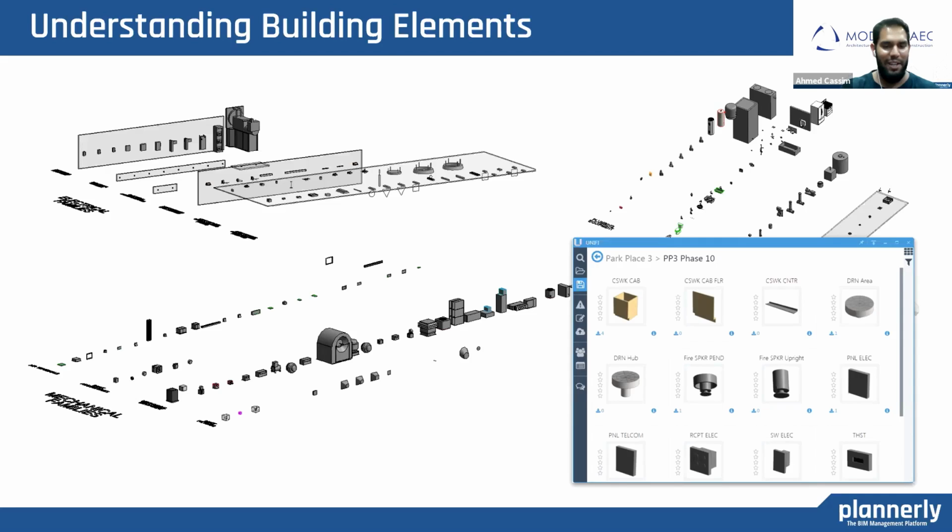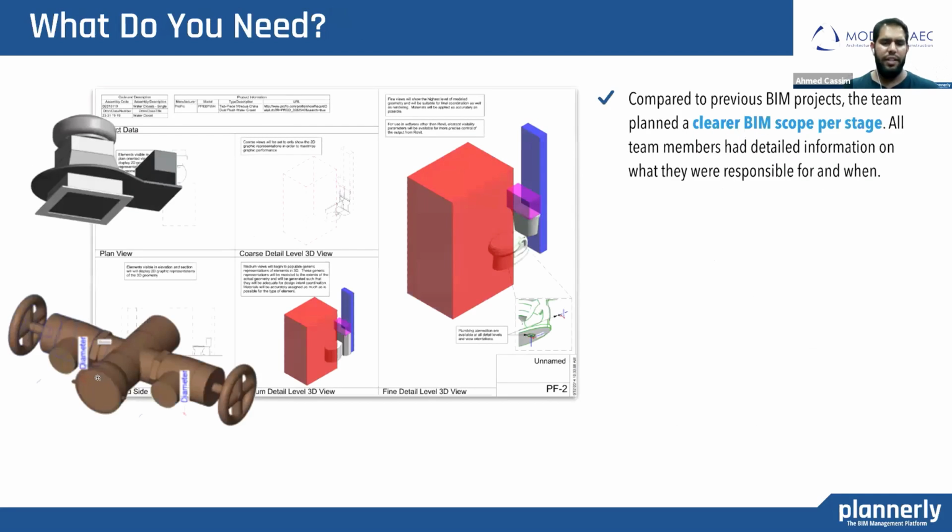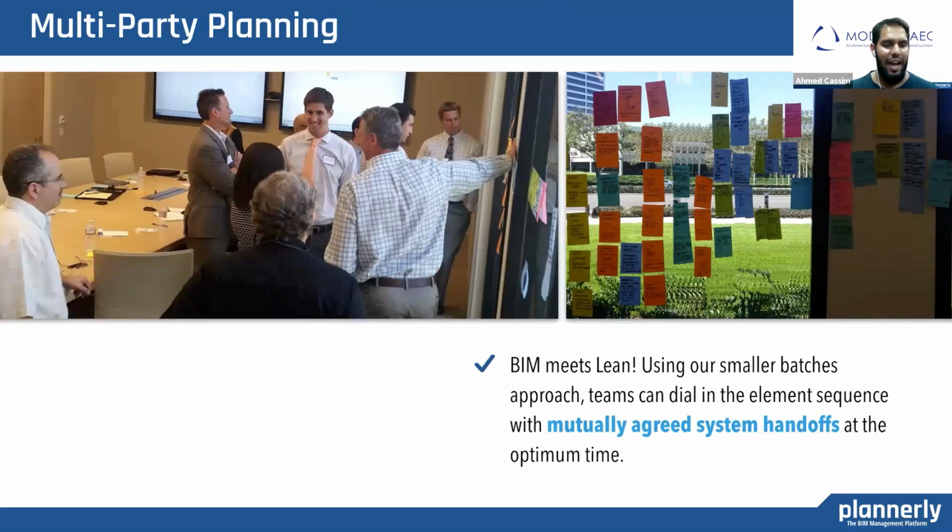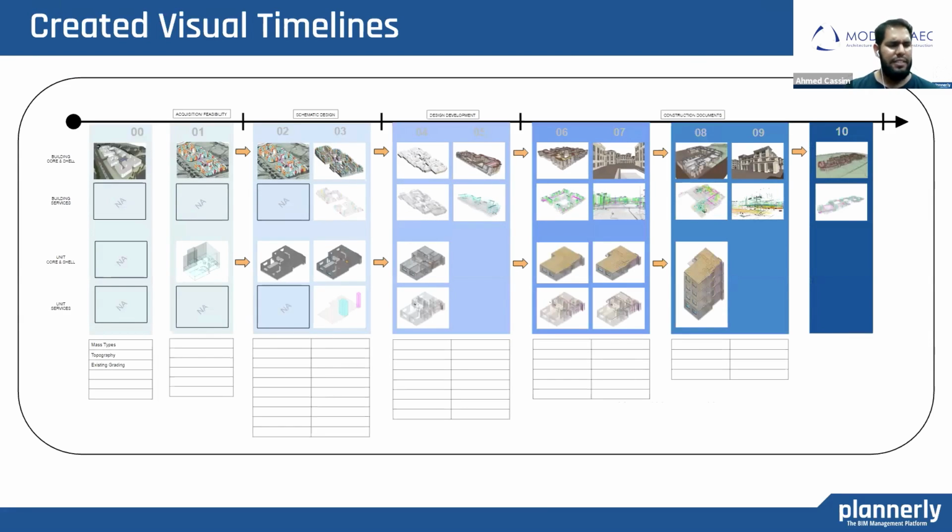And it's important to have multi-party agreements, because if we carry on behind closed doors, we are sure to have many more disagreements between stakeholders. Mutual agreements happen when all parties are in the same place doing pull planning. So in our current situation and our current work methods, we can't all be in the same room at the same time, so use online tools and programs to replicate that same process. It will become very powerful to get that agreement, as you have handoff of information and handoff of responsibility at the right time. So to get agreement, it must be less mandated and more discussed and agreed on by teams, because it becomes their responsibility, because they agreed to it in the meeting.